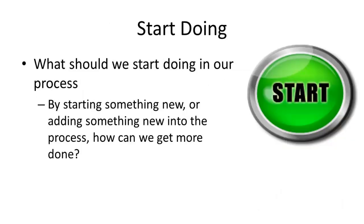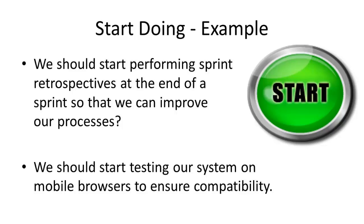What should we start doing in our process? By starting or adding something new into the process, how can we get more done, increase our velocity, or increase our transparency? This is focused on process improvements that involve the entire team, not individual improvements. For example, we should start performing sprint retrospectives at the end of a sprint to improve our processes. Another example: we should start testing our system on mobile browsers to ensure compatibility, or at least use an emulator that simulates mobile screen size. This could save time for developers and testers, allowing work to get through the process the first time rather than failing due to mobile incompatibility.